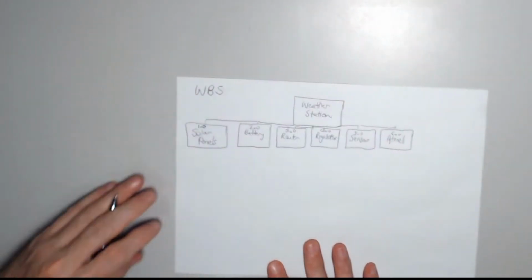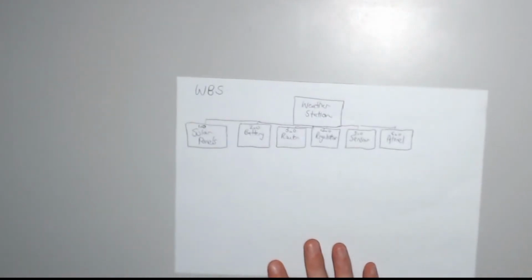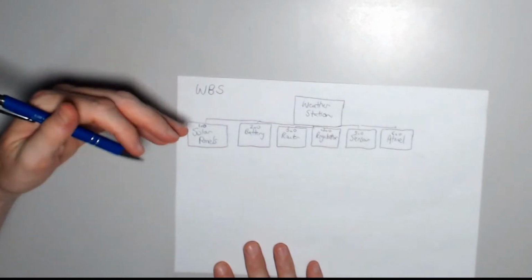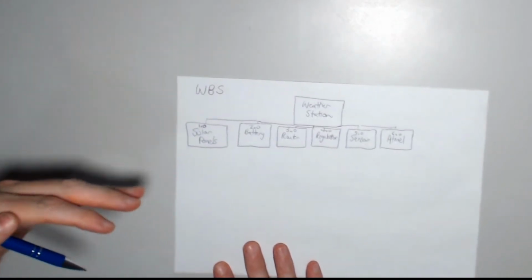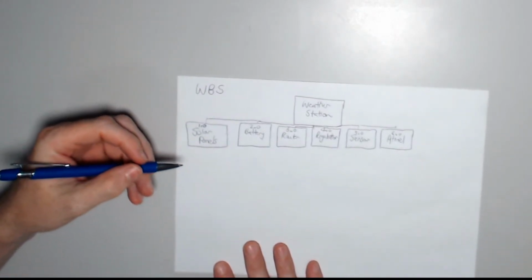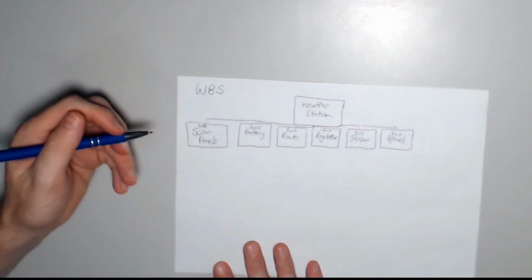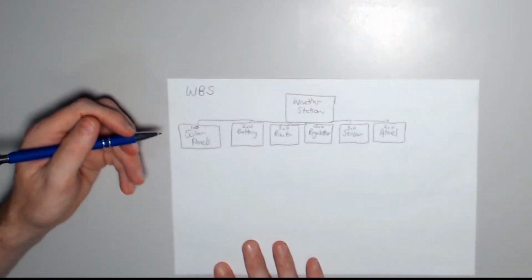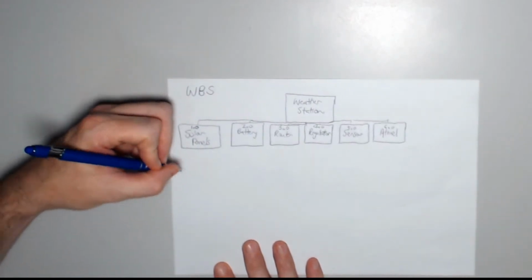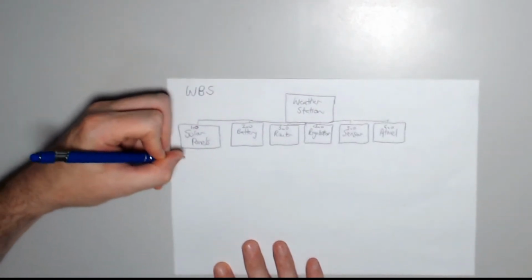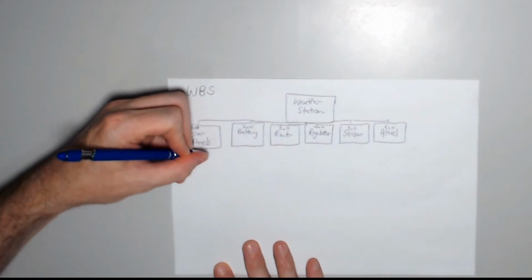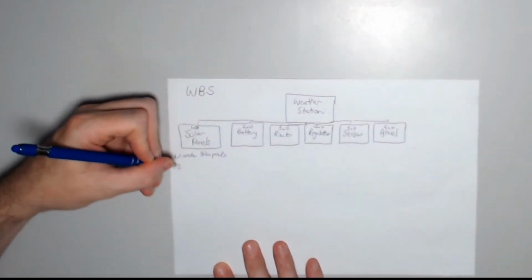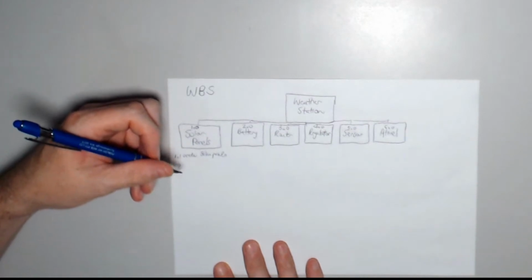And so we need some activities for these. I'm going to do it by process. So I've done it by product, and now I've decided that at this level, I'm going to work out the activities by process. So the first one on the list is I'm going to need to order some solar panels. So order solar panels, it's going to be 1.1. 1.2 will be install on roof when they arrive.